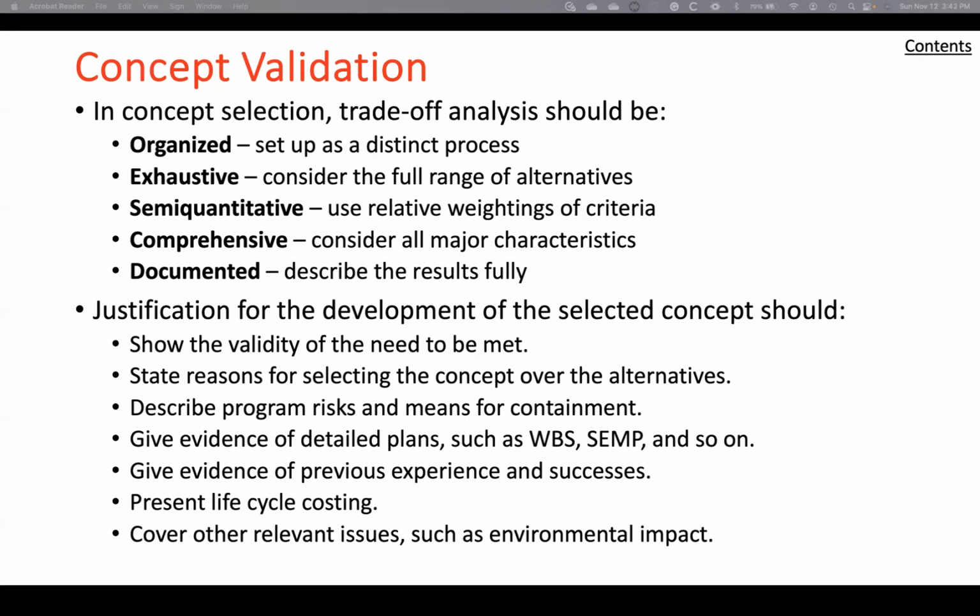For critical experiments, when a proposed system concept relies on technical approaches that have not been previously proven in similar applications, their feasibility must be demonstrated. Often this cannot be done credibly through analysis alone and must be subjected to experimental verification. This is difficult to accommodate in the limited time and constrained resources of a competitive acquisition, but must nevertheless be undertaken to support the proposed system concept.